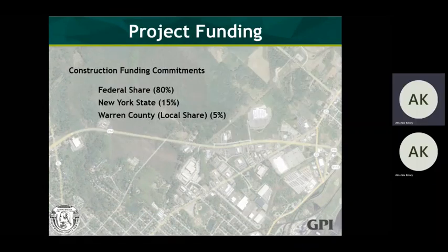The construction funding commitments for this project include an 80% federal share, a 15% New York State share, and a 5% local share for Warren County.